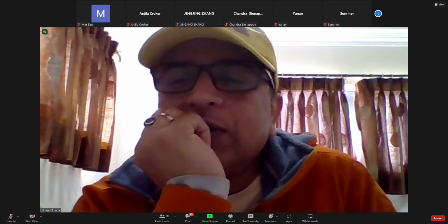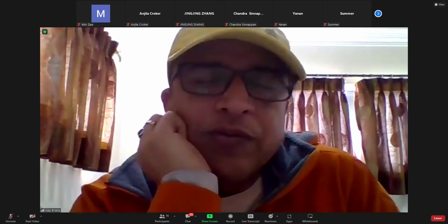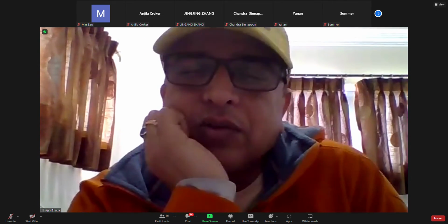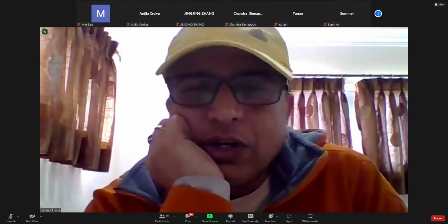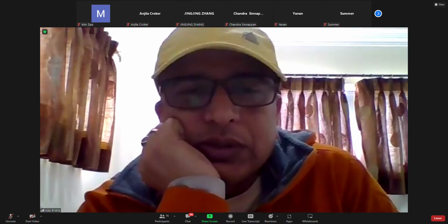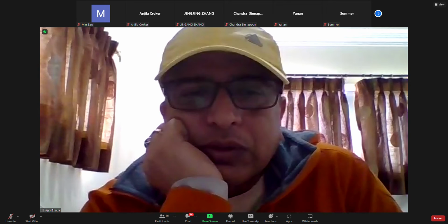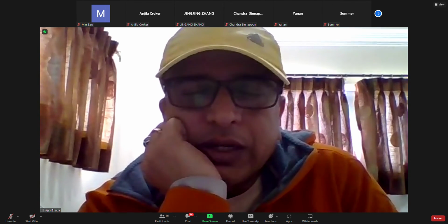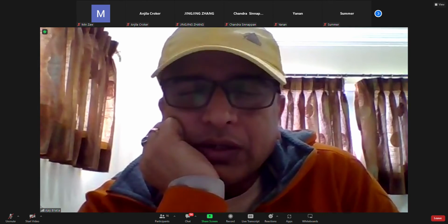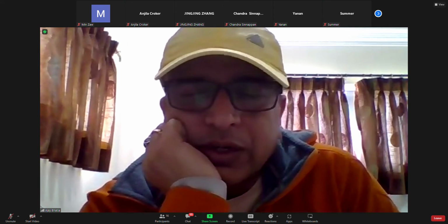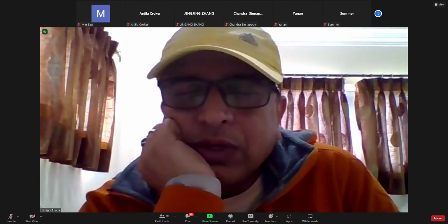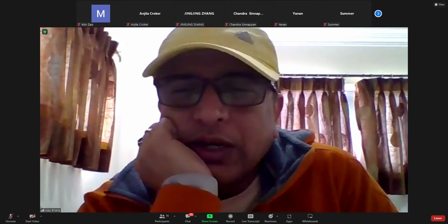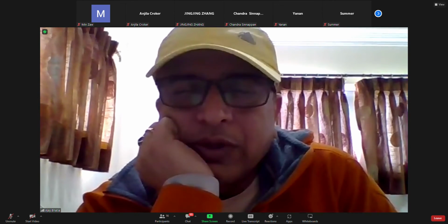Is this also included in equal angle? Yes, for equal angle, if you are given the weight per meter for that thickness, you need to see your table first. In your table, for that thickness and that size of equal angle, you are given a per meter weighing factor. Then you don't have to calculate area. You just calculate the length and multiply it with that factor.